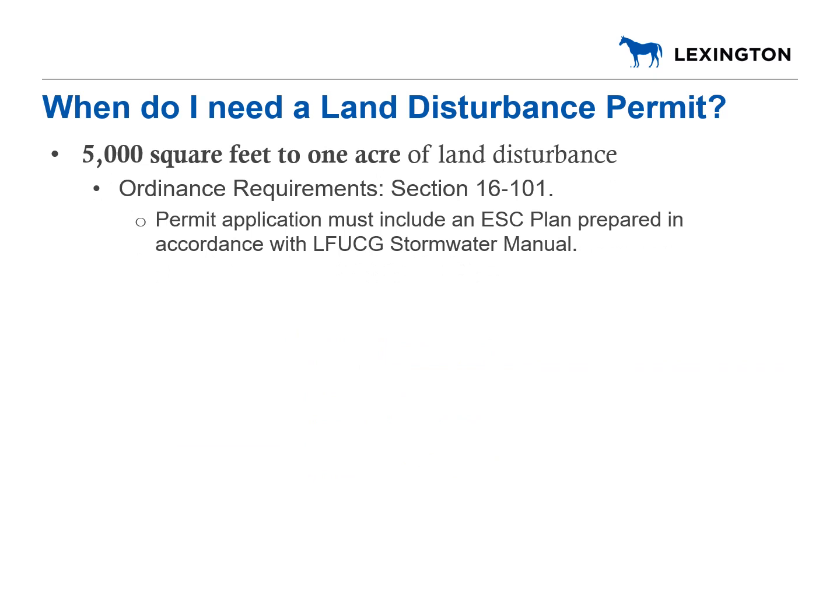When a building is not being constructed, a land disturbance permit is required once 5,000 square feet of land is disturbed. An erosion and sediment control plan is required as part of the land disturbance permit submittal.